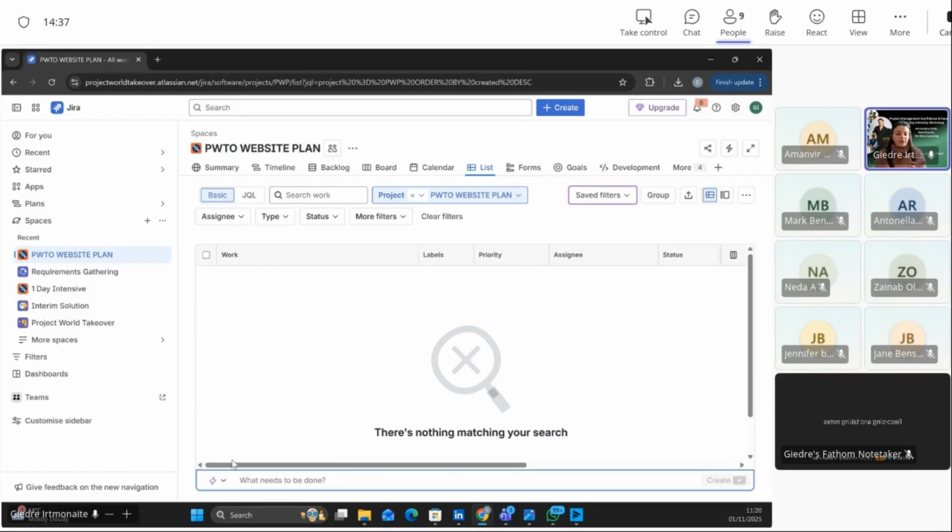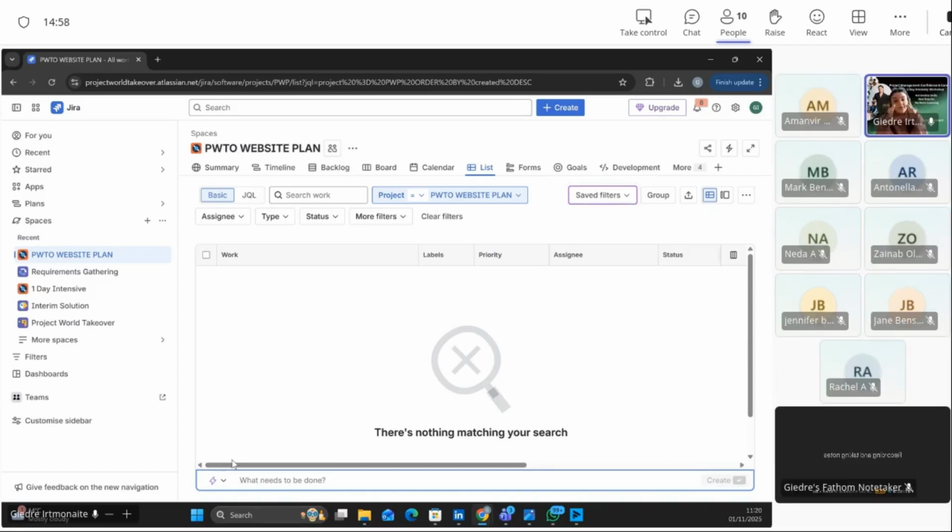So, right, from one of the epics, right? From your perspective, what do you believe should be the main milestones for this platform going live? It's the big things that we need to achieve to make sure we reach the goal. And then from those big things, we start breaking it down into smaller tasks.